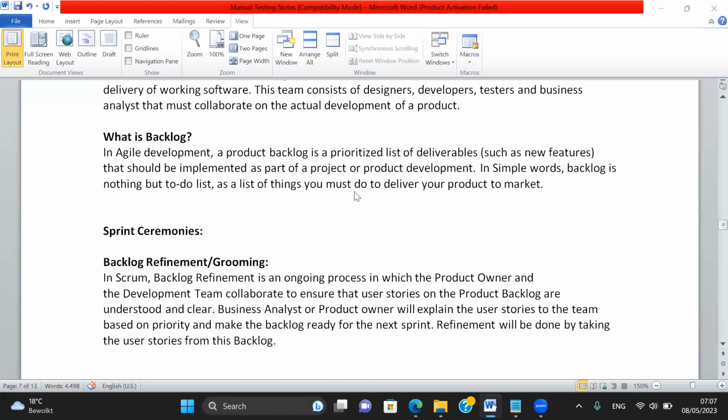So before each sprint, the refinement session will be done. In the refinement session, they explain the stories. So based on the stories, in the planning you can think how many stories you can take and work on. Is that clear? For example, from 100 stories, in a refinement of 1 or 2 hours, they explain some 8 stories.